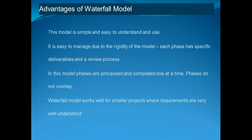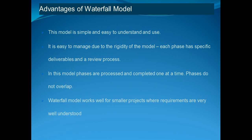The advantages of the waterfall model are as follows: this model is simple and easy to understand and use. It is easy to manage due to the rigidity of the model — each phase has specific deliverables and a review process. Phases are processed and completed one at a time with no overlap. The waterfall model works well for smaller projects where requirements are very well understood.